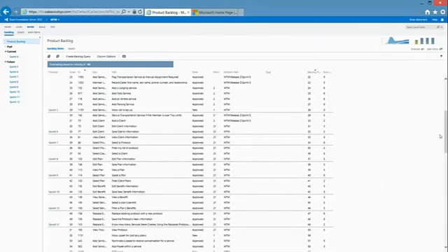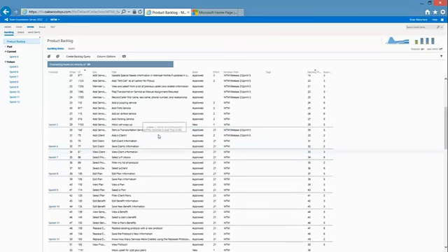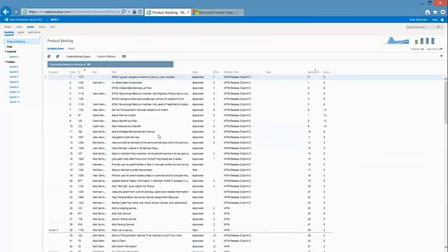And that's where these lines that you see for Sprint 5, Sprint 6, Sprint 7 have come from. The teams previously estimated the effort of each of these different user stories, and we've said that we can handle about 60 user stories this sprint. So if you look above the Sprint 5 line, that's what we feel right now that our team can take on in the next sprint.